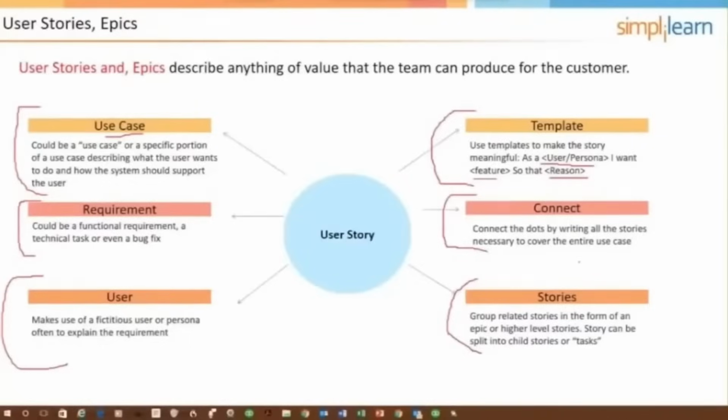Like in the question that we had at the end of the last section, where the product owner needed something done and the team said, well, based on the size of this user story, it's going to take 3 sprints to do. Well, a user story has to be small enough to be completed within a single sprint. So a sprint can contain more than one user story, but a user story cannot span more than one sprint. So that feature or function that was in the question was probably more like an epic.